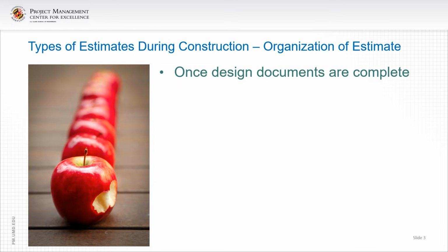If it is bid in an acceptable manner, a construction company is legally bound to a specific price for a specific scope of work. During the actual construction, however, there is give and take over the individual prices of each piece of the construction. The contractor must continually negotiate with suppliers and subcontractors over these prices throughout the procurement stage. If the contractor is a good negotiator and has priced the project with an adequate contingency, then the final outcome should give the company a fair profit.